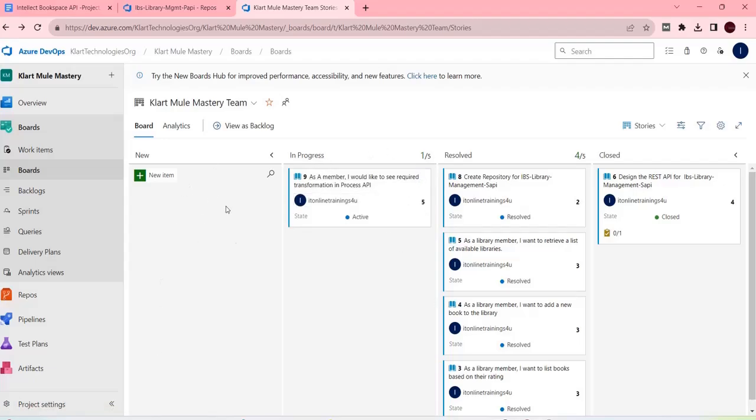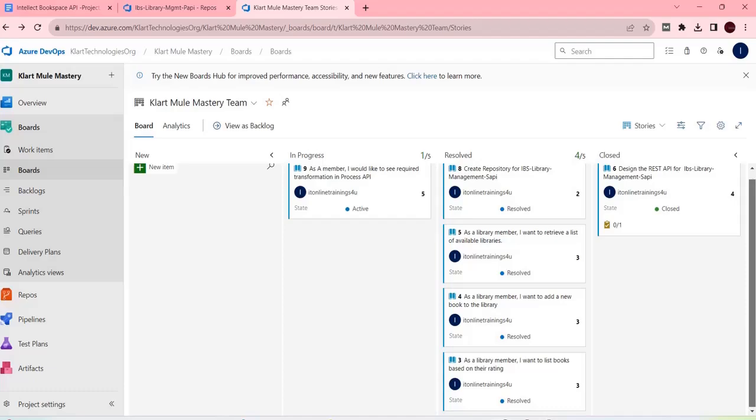We will have a lot of user stories in the product backlog or the sprint backlog. You can just pull them and use them. Or if the business analyst missed any new user story, any feature or functionality, then in that case you can create a user story on your own. Then you can assign it to yourself and explain the need for that user story, why you created this new user story, to the scrum master. Once he approves, you can work on it.